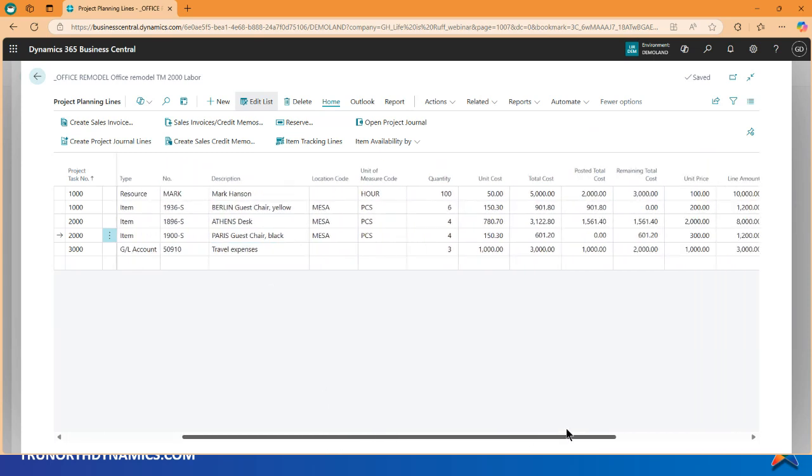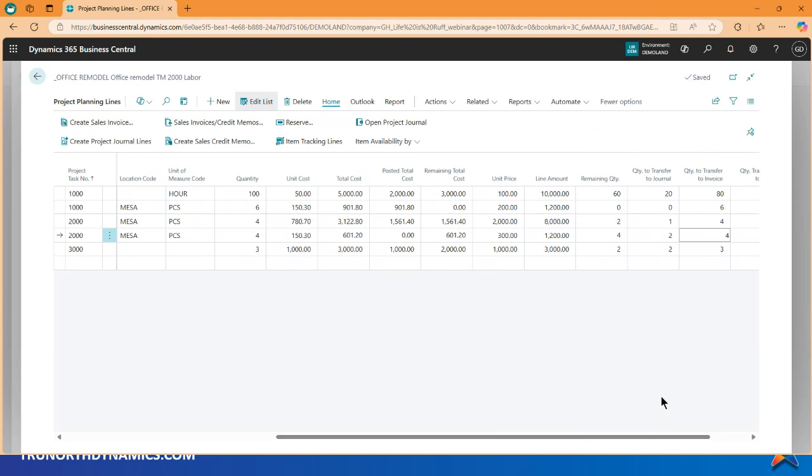So what I'm going to do here is I'm going to say, okay, I've already made 1 trip. I have to make 1 more trip that I'm recording the expense for. I'm not doing anything with invoicing right now. I'm just recording the activity for this project, whether you record it daily or weekly, depending on how busy your projects are. You may not want to wait monthly because then you've got a bigger margin for error.